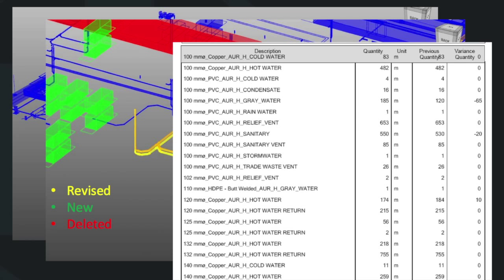Revisioning, I'll show you an example of this on Sunny Coast. But basically, it doesn't matter what the model is. This is a Costex view. It does this very, very well in terms of comparing one model to another. We can see changes, and then we can produce reports precisely of what it is. The way you use that stuff is in negotiations or justifying price changes. And again, it's a very strong tool.